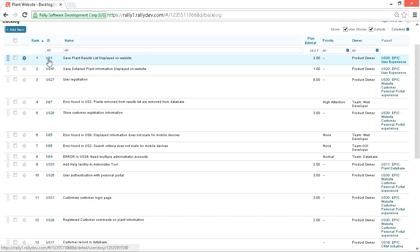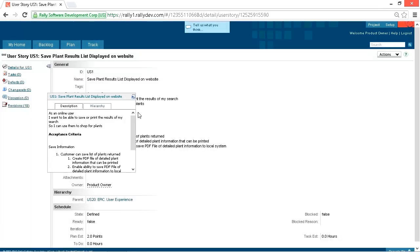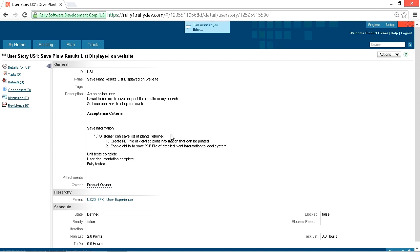If we look at a good user story, here's US1. This is Save Plant Result List displayed on the website. This is only two user points. As an online user, I want to be able to save or print the results of my search so I can use them to shop for plants. That's very focused. The customer can save the list of plants returned. We can create a PDF file so they can print it, or they can save it to their local system. Unit tests are complete, user documentation complete, fully tested.